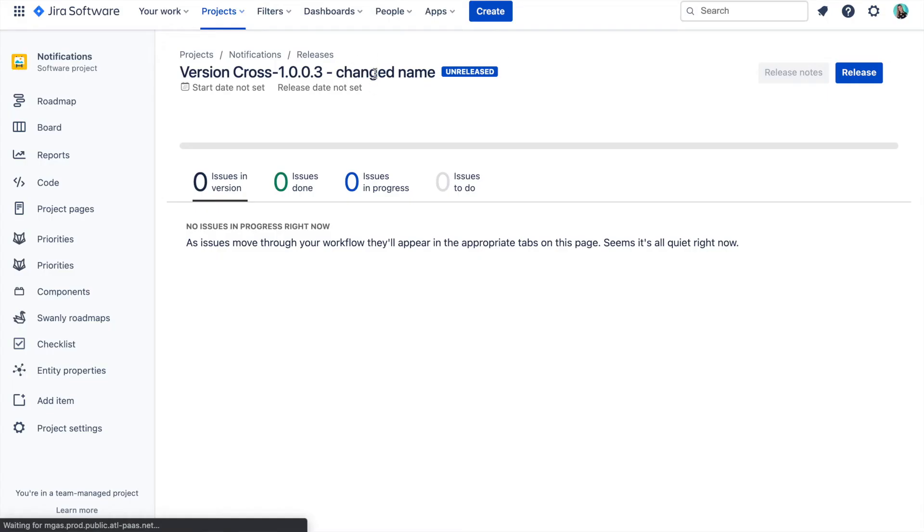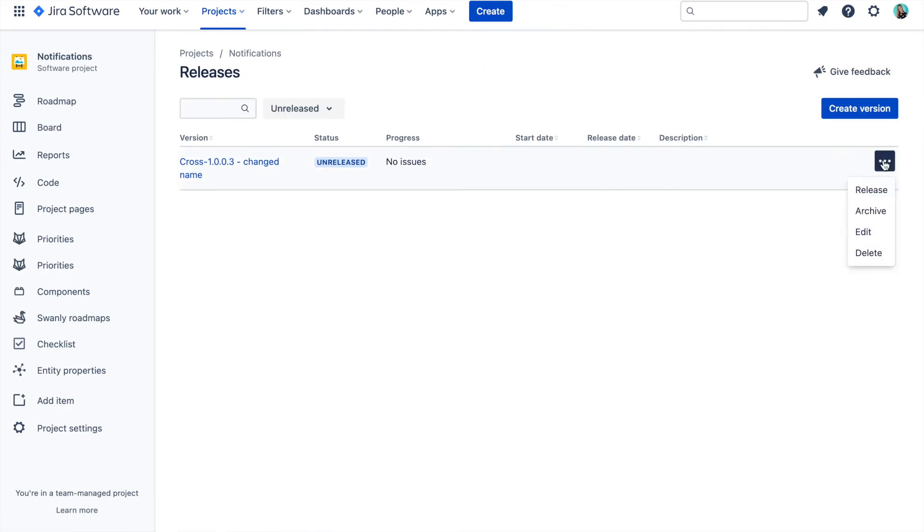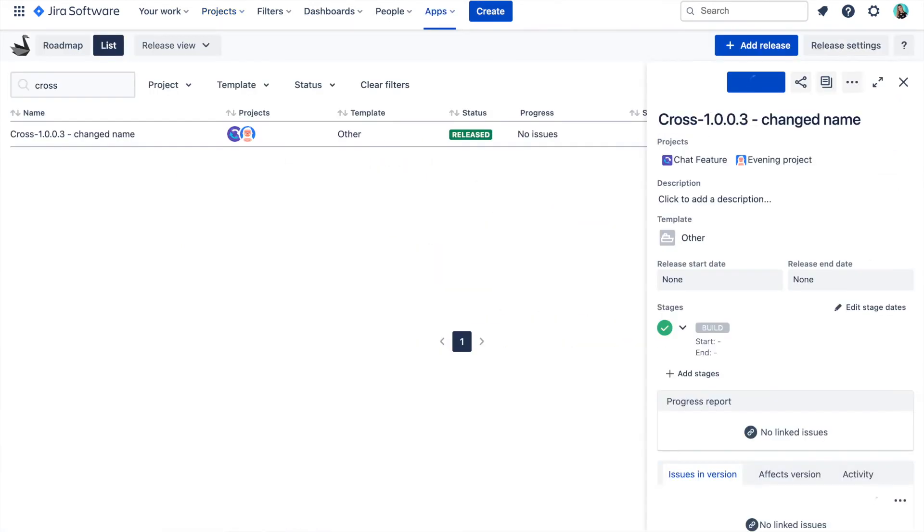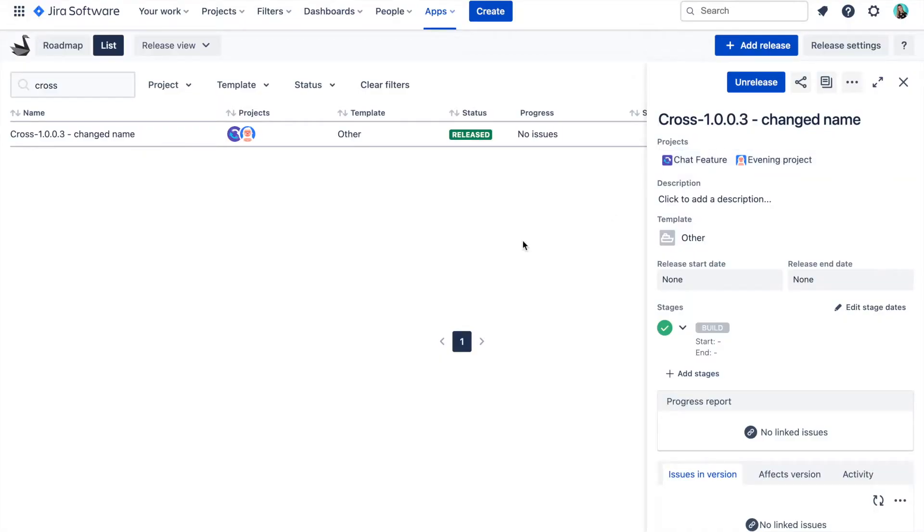In that case, only that version gets deleted and the others remain as they are. If you would like to delete the cross-project release as a whole, you need to do so from Swanly.